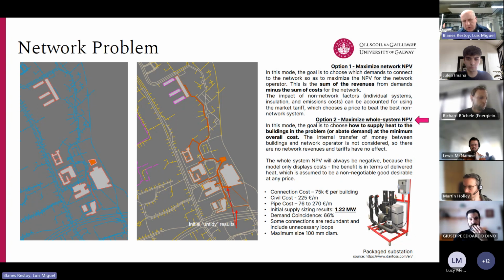There is a huge difference, and this is kind of a battlefield for, let's say, engineers, developers, etc., to know really what the cost of construction is here in Ireland. And there's a tendency to underestimate costs. But in the national cost study, for instance, there are considerations on trench costs, piping costs, etc., that are far away from what we have maybe in the market. So we need to understand why that is.